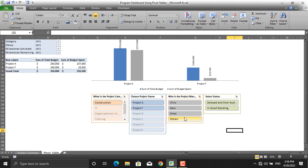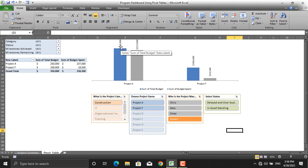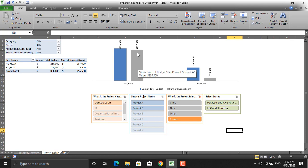I selected Stephen. Stephen manages two projects which are under the construction category. For project A, the sum of the total budget is $250,000 and what he has spent is $237,000. For project F, the situation is shown here as well.